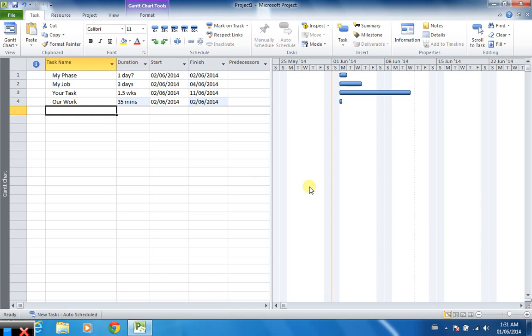I'm now going to add in one more task that I usually have in here. It's known as a milestone. And as I hit enter, the spelling I chose was done. Microsoft again makes the assumption of 1 day. To create a milestone task within the msProject environment, simply set the duration as 0, and that would be 0 days.